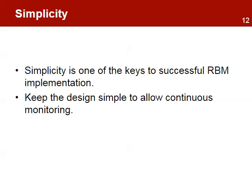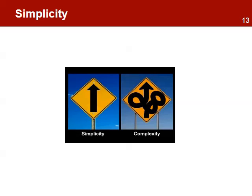Simplicity is one of the keys to successful RBM implementation. Rather than focusing on a core set of expected results, the tendency has been to design complex results change. This approach significantly increases the number of performance indicators required to produce reliable performance information. In this situation, data collection, analysis, and reporting can take a large amount of resources and management attention. The key is to keep only the necessary results and indicators for continuous monitoring across the entire results chain. RBM uses a strategy that is easy to understand and easy to put into practice.